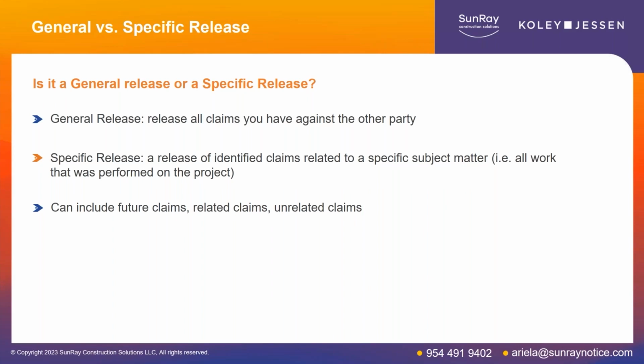And so that, as drafted, is much broader than simply the project that you are working on. That can be a dispute over money that you lent them. That could even be a dispute related to an intentional tort where somebody may have assaulted somebody or there was a car wreck, but it is any type of claim that could end up in court is being released as part of that general release.